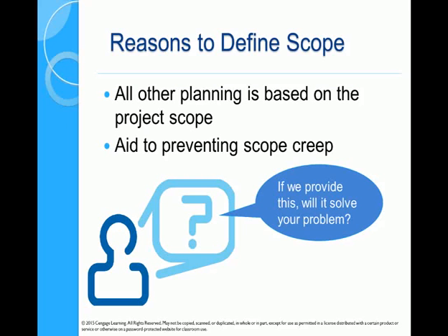Essentially, when we get to do the WBS and the WBS dictionary, all the other planning documents rest upon those. So what we want to build helps us decide when we're going to do it, who we require, what communication might be needed to be undertaken, what are the risks involved. So the scope really is the basis. This is the first thing you do in the planning stage. You work out what are the details, how do we go about delivering it.